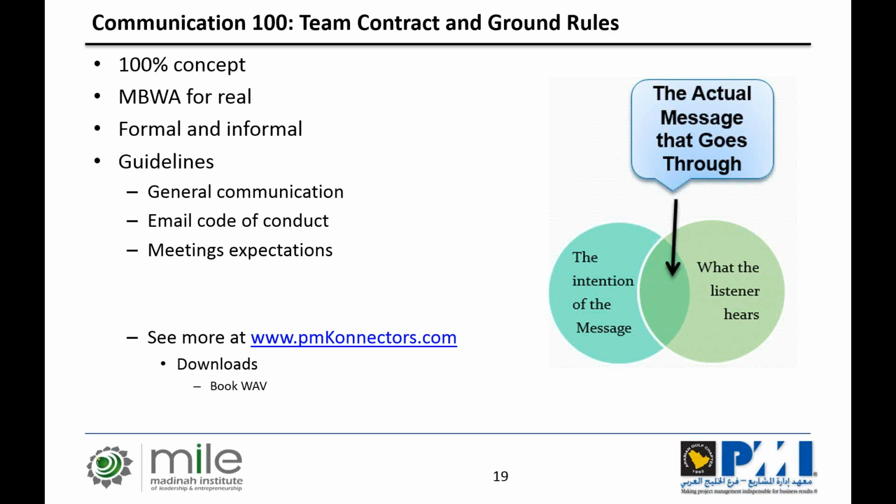Generally, for example, here now, we are on 2 sides of the world. You guys are in the afternoon, it's almost 4:30 your time, and my time is 8:30 in the morning. So obviously, if we are trying to conduct business together right now on a project, one of us probably has to either stay late or wake up early, right? So we have some time of overlap. These are the things that I want to establish in the communication. When you tell me that you need something by 5 p.m., I need to know which 5 p.m. it is. Is it your time or my time? These are basic things that cause so many misunderstandings in projects. Even here in North America, we have Pacific time and we have Atlantic or Eastern time, and they are 3-4 hours apart. And once again, a lot of confusion.